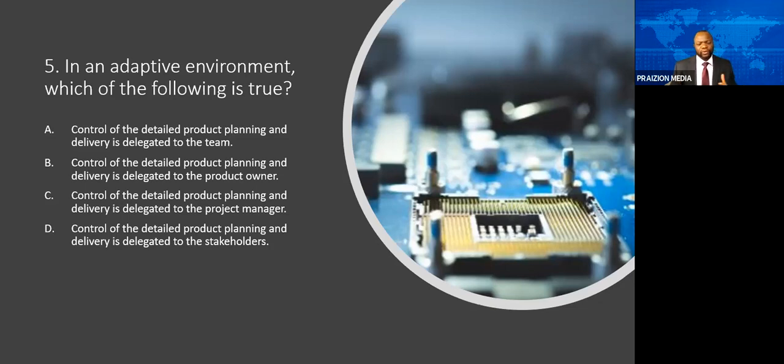So whenever you get questions that say who is in control, you want to err on the side of the team. Now, the product owner has some very specific tasks that have been assigned to him or her, such as funneling in those stories, those user stories from the business. But the moment it hits that product backlog and we're beginning to plan what to do and how to do it and when, it is no longer in the product owner's sole jurisdiction.